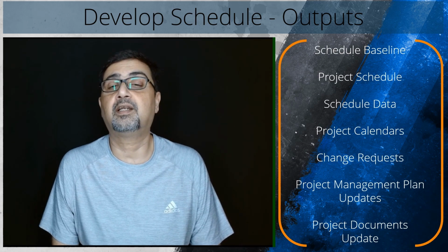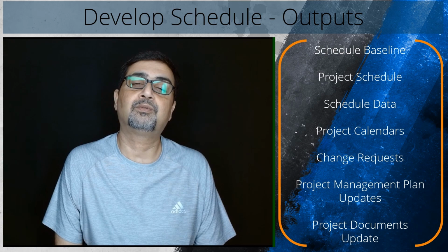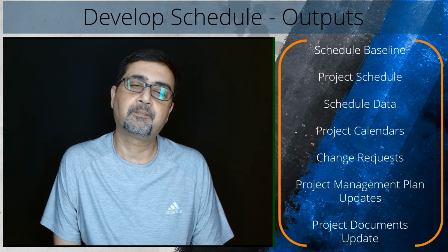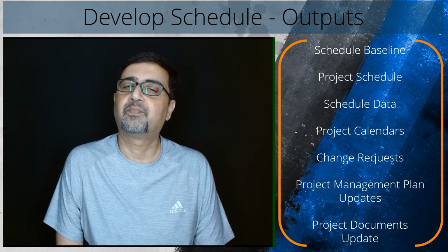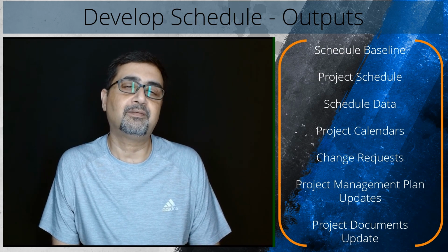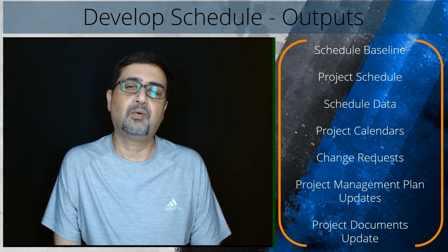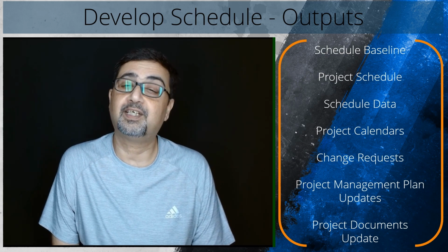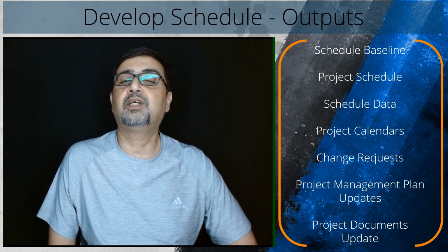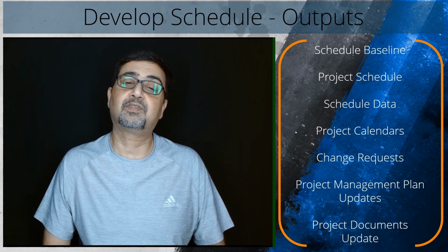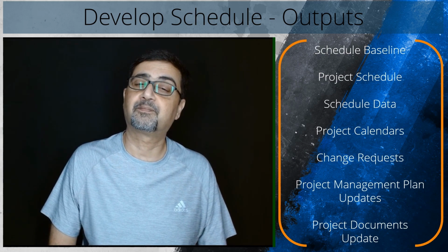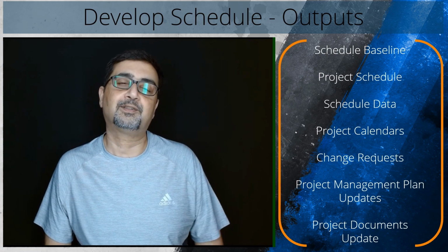Information frequently supplied as supporting detail includes resource requirements by time period, often in the form of a resource histogram, alternative schedules, such as best case or worst case, not resource leveled or resource leveled, or with or without imposed dates. Applied schedule data could also include such items as resource histograms, cash flow projections, order and delivery schedules, or other relevant information.